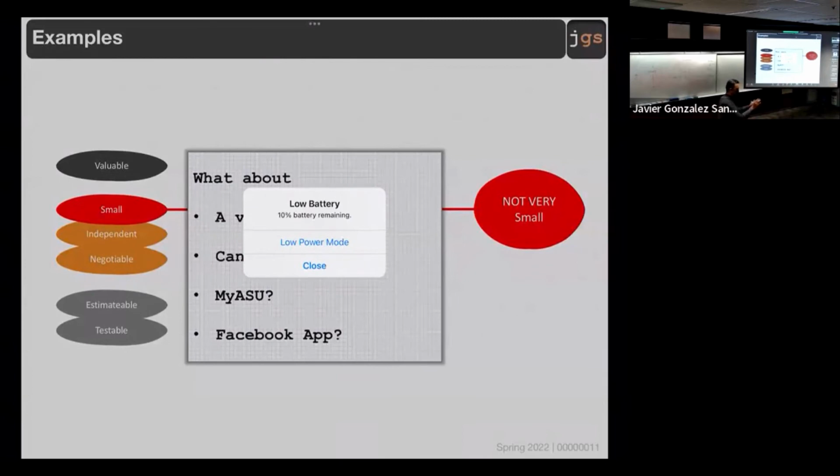Yes, and let me just be specific here. It's a requirement, yes, for sure. However, when we talk about whether it's going to be in the web browser, or in a mobile application, or whatever, we are not talking about a service, a functionality, or a reaction, but about the Pac-Man moving in the web browser. We talked before about the Pac-Man moving, but we do not need to specify where. When we talk about where, it's a non-functional requirement. Why? It's going to be a constraint, something about the environment.